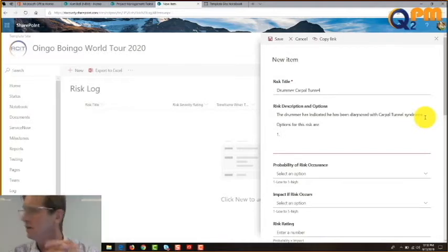What are some options? Now, what we're going to do is, as a bad PM, I would go to the project, who am I going to communicate the risk to? Sponsor. If I was a bad PM, I would just tell them about the risk. It's like I like to say, it's like throwing a bunch of garbage in their lap and saying, take care of this, right? As a good project manager and business analyst, I'm going to go to them, communicate the problem, and give them some options and some pros and cons and even a recommendation, make their life easy. So I get to do the hard work.